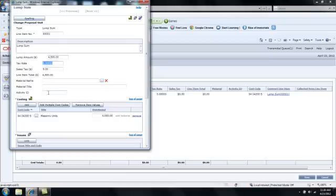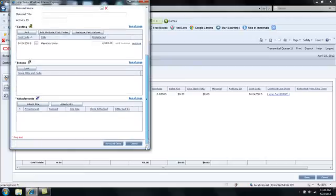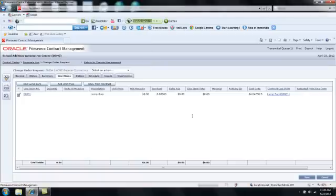If I'm using the cost worksheet, I would want to make sure that I distributed that amount to a legitimate cost code. I'll scroll down to the bottom, Save and Close. I'll save the change order request.